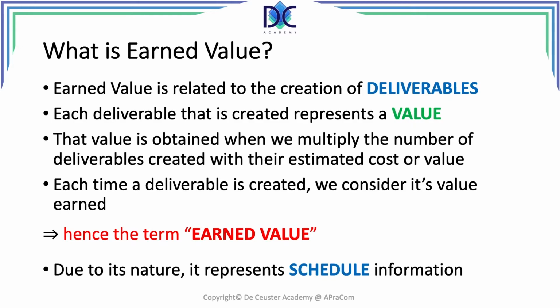We obtained that value when we multiplied the number of deliverables with their estimated cost or value. Each time a deliverable is created, we consider that its value has been earned. That's why we talk about earned value.